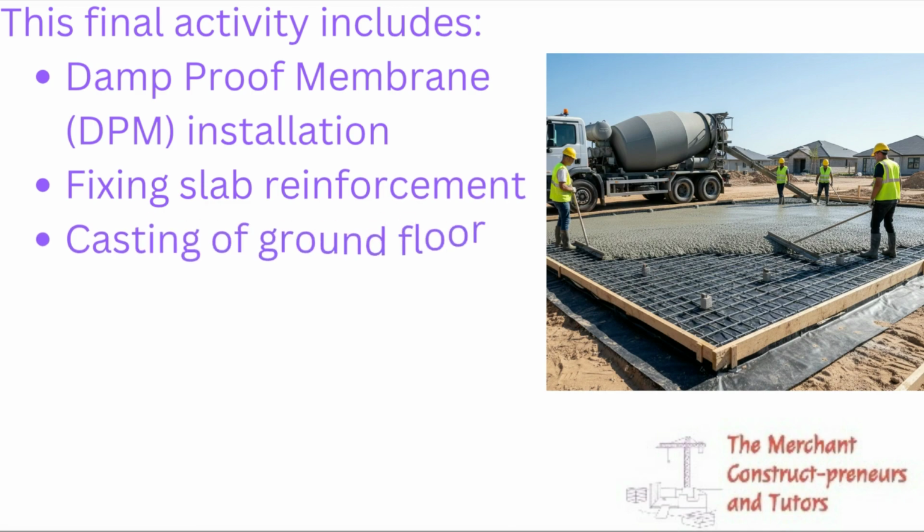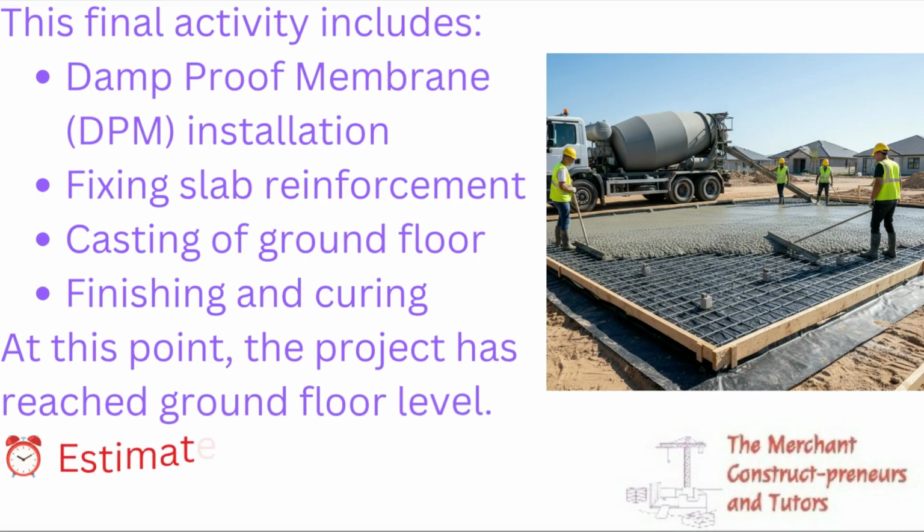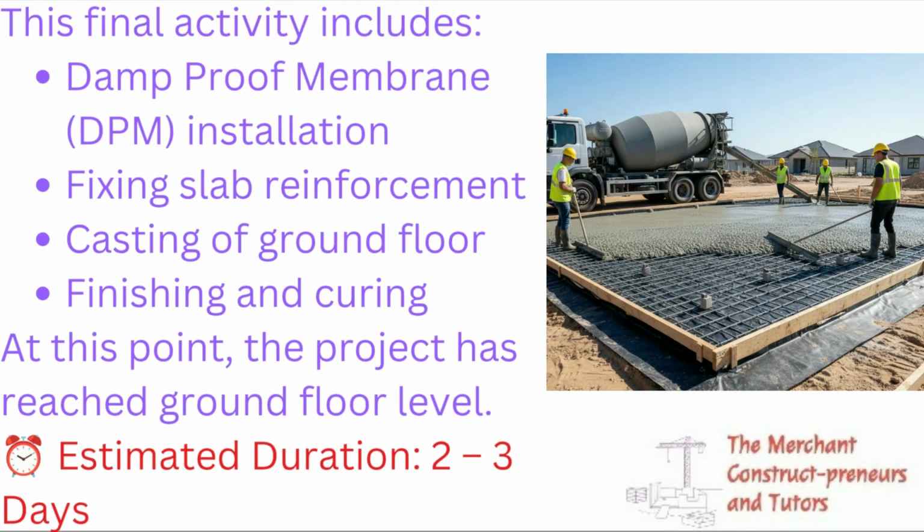I think this is the final step, and this final activity includes damp-proof membrane installation, like the nylon, like the black line, as you can see in the image there. Now you fix your reinforcement, right? Then you cast the ground floor, then you do the finishes depending on the type of finish you want. If it is tamping, if it is power tool finishing, you finish the surface depending on the type of finish you want. But this is what this last stage entails: damp-proof membrane fixing, slab reinforcement, casting of the ground floor, finishing, and curing. And this activity takes 2 to 3 days.